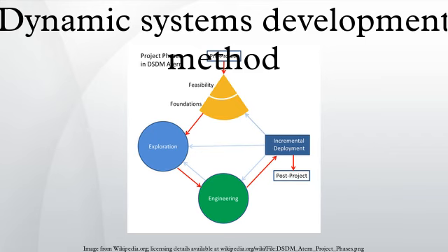The functional model iteration can be subdivided into 4 substages: Identify functional prototype, determine the functionalities to be implemented in the prototype that results from this iteration. Agree schedule, agree on how and when to develop these functionalities. Create functional prototype, develop the prototype. Investigate, refine, and consolidate it with the combined functional prototype of previous iterations. Review prototype, check the correctness of the developed prototype. This can be done via testing by end users. Then use the test records and user feedbacks to generate the functional prototyping review document.